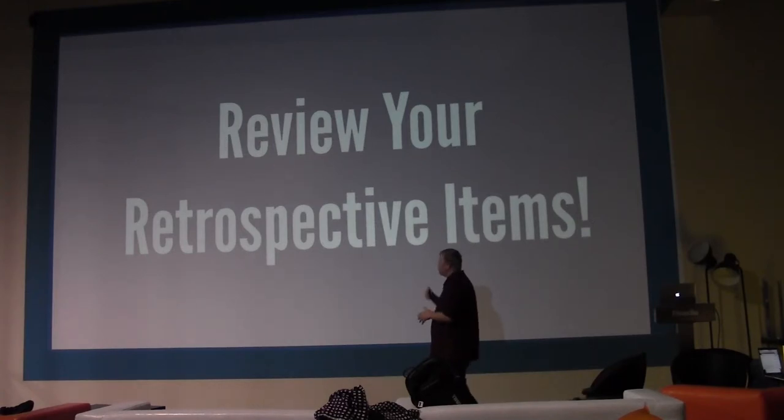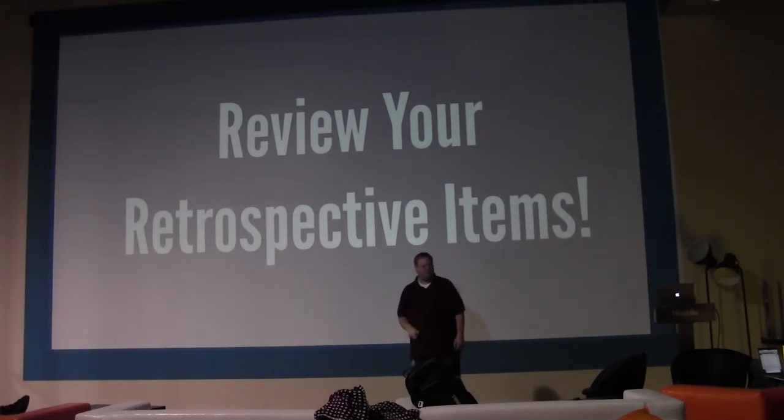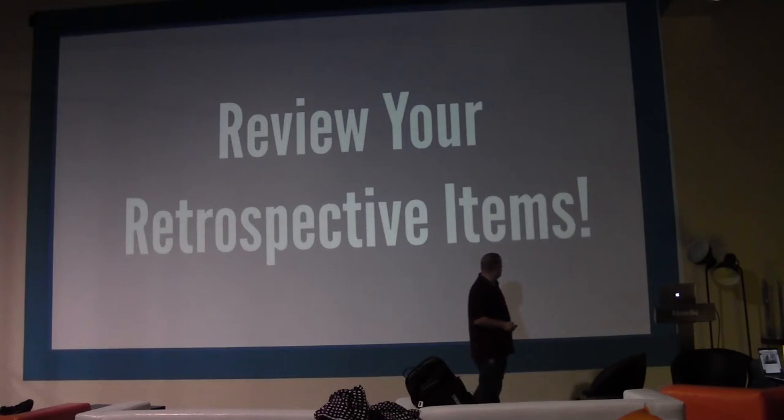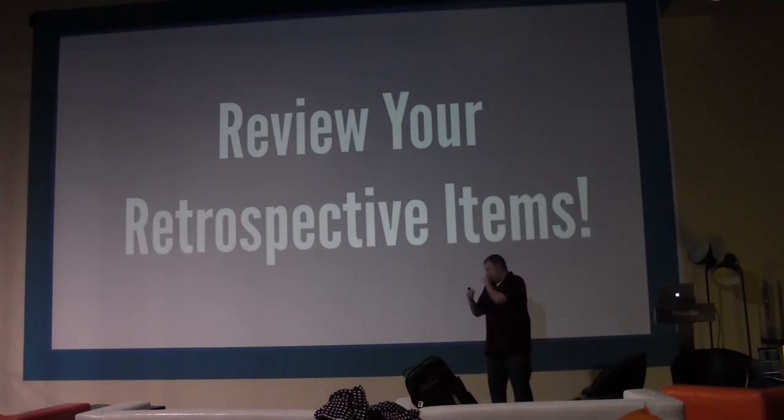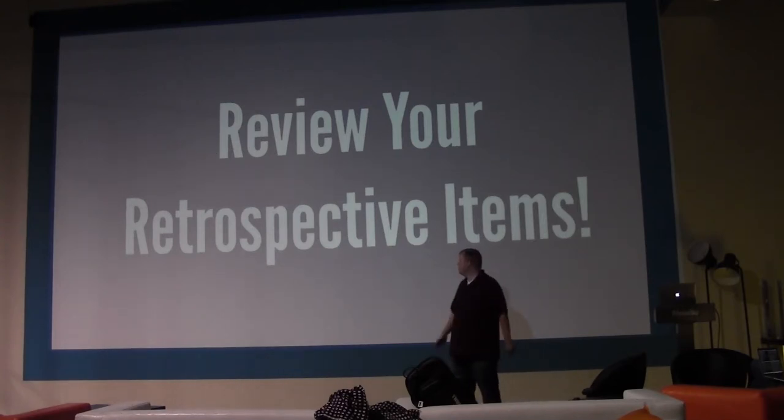So make sure you review your retrospectives. When you sit down and say, hey, this is what we said last week, how did we do? Do we need to carry over something? Or are we doing good? And sometimes we have things that we wanted to try and said we'll do X, Y, Z, and we never did for 2 or 3 or 4 weeks. And we would say, okay, this obviously is not working. How else can we tackle this problem? And we find a way to make something work.